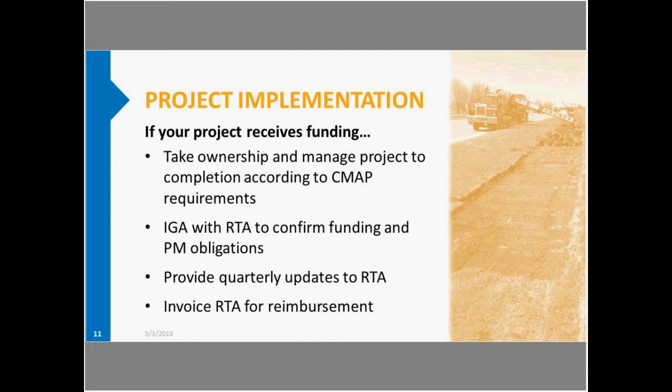Sponsor communities are also going to need to enter into an intergovernmental agreement with the RTA, and the reason that we do this is to confirm the funding obligations and the project management expectations. I request status updates from the sponsor communities on a quarterly basis, and I'm available to offer assistance with questions and issues that may arise in the course of engineering and construction processes. But I should mention that the RTA doesn't have the staff resources to oversee the engineering and construction processes. So the bulk of that falls on the responsibility of the project sponsor.